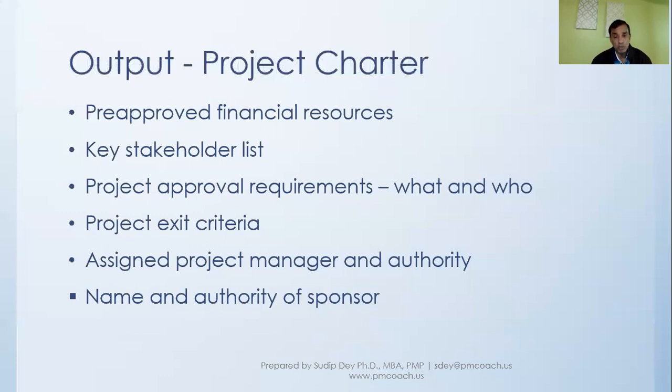And the name and authority of the sponsor. Who is the sponsor of the project? The project manager is not the sponsor. It is someone other than the project manager, typically a little more senior in the organization, who has the authority to sponsor the project. So this is also something we'll put together in the project charter, and this project charter really starts the project, the next step of the project.